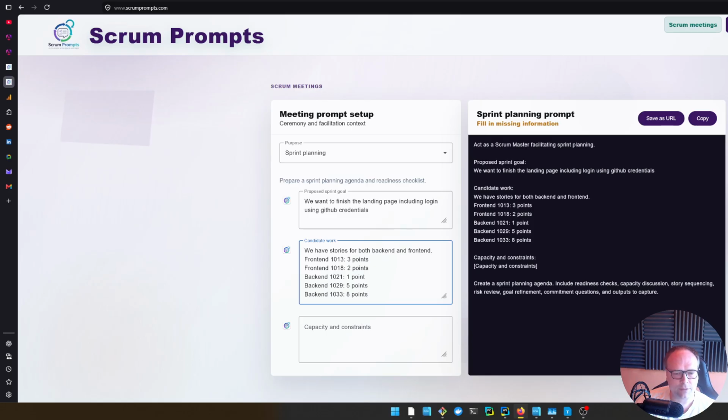You take from the backlog. The backlog has already been prioritized by the product owner. So you just check the JIRAs there, and then I've just added a front end. It's just to add a description on each of these, and then you add the JIRA numbers, and then the estimate next to them, like this: 3 points, 2 points, 1 point, 5 points, 8 points, etc. You don't have to do it this specific. You can also just add them.